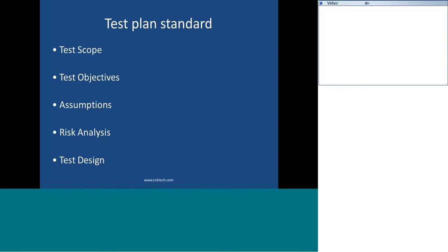What is the mitigation plan for us? So it affects our schedules. If they have given a 2 month timeline for testing and the development team is already delayed delivering the product by 2 or 3 weeks, it affects the testing schedules, and we may end up having only 1 month of testing. So in that case, what will our plan be?